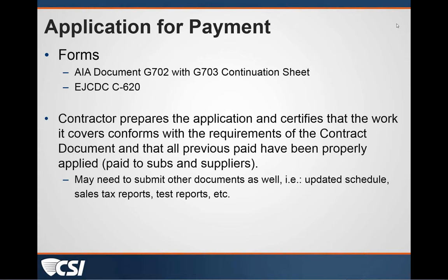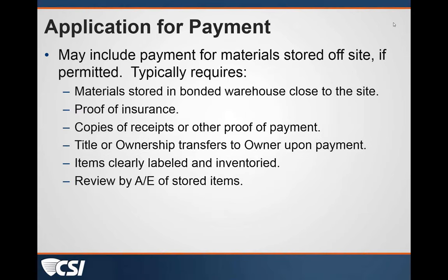Next slide. Doug, while we're going to the next slide, one of the things I try to make a habit of during my site observations is to talk about payment. I talk about this in the pre-construction conference and let folks know that it's something I'm going to chat about. I want to be sure the money is flowing as it should, and I know some have had the experience that they get a signed and authorized payment of debts and claims and release of liens when, in fact, that is a false document. While I'm not trying to say that we're obligated because someone provided us inaccurate information, I think it's a good idea to follow up with folks on the job to be sure that they are being paid.